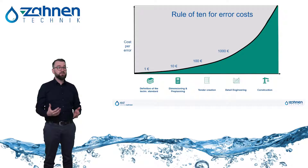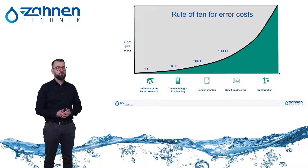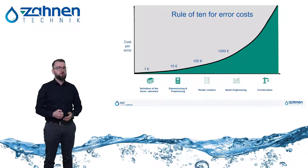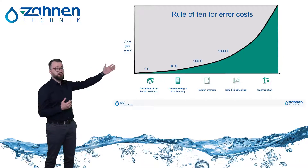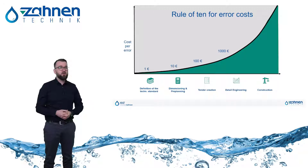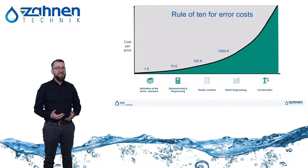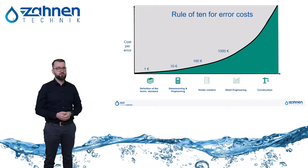Mistakes of this kind mean additional work and cost nerves, money and time. The rule of 10 for error costs states that the costs for error elimination increase by a factor of 10 with each project step. Consequently, mistakes should be detected as early as possible, or even better, not happen at all.